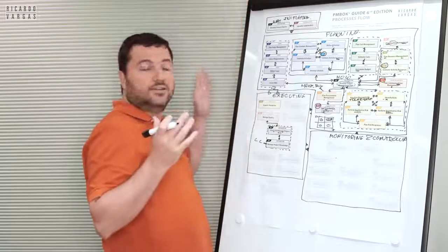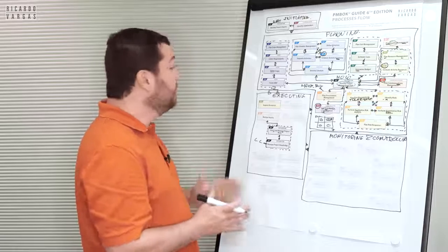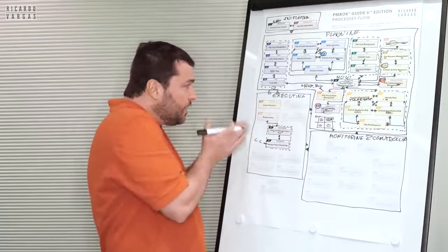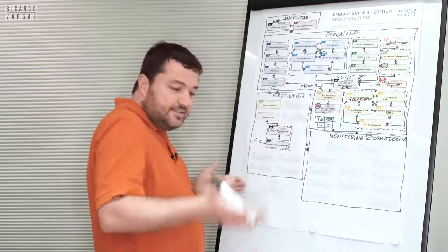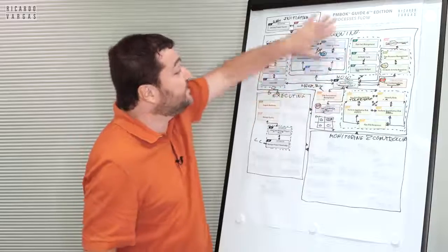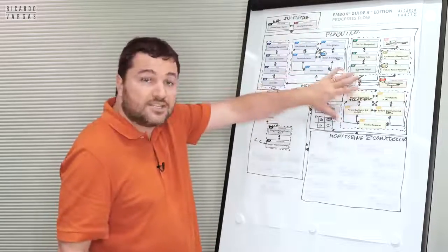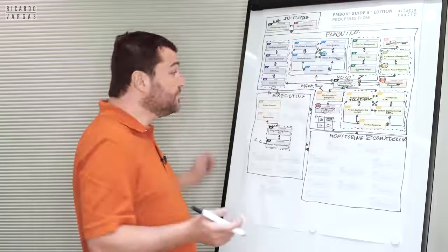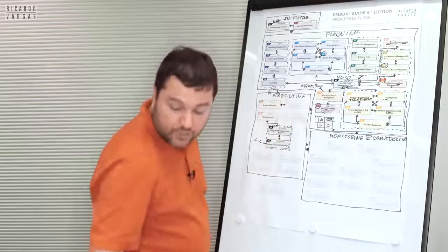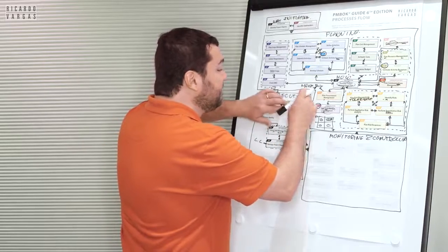Of course, look, this is not mathematics. This is project management. So maybe sometimes there is a delay between the time that you acquire the resources and the time they are available for you. So many times you need to anticipate and start some procurement process and some acquisition process here, of course, for obvious reasons. Then, of course, for the human resources you acquired, you will develop a team.